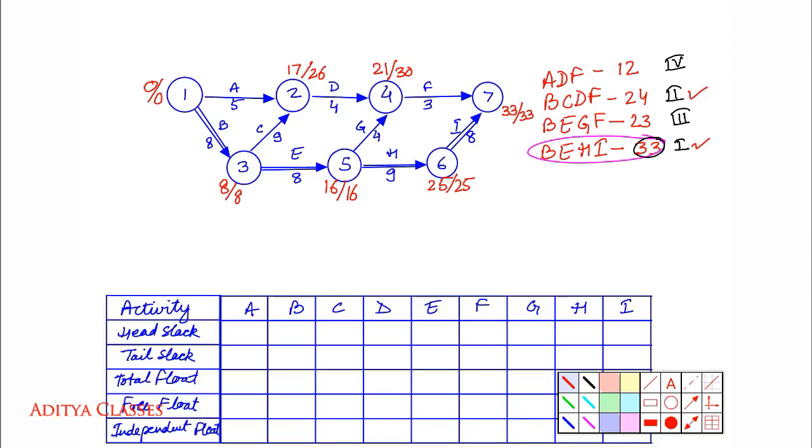Now let me see BEGF. We have B, E, G, and F. Forward pass: 0 and 8 is 8. 8 and 8 is 16. 16 and 4 is 20. Should I write 20? No, it will be 21 because we are in a forward pass. 21 and 3 is 24. Should I write 24? No, it will be 33. Let us jump to the backward pass: 33 minus 3 is 30. 30 minus 4 is 26. Should I write 26? No. In a backward pass, we write the smaller of the values. So we will leave it as 16. 16 minus 8 is 8 and 8 minus 8 is 0.